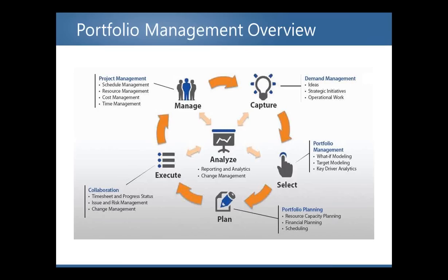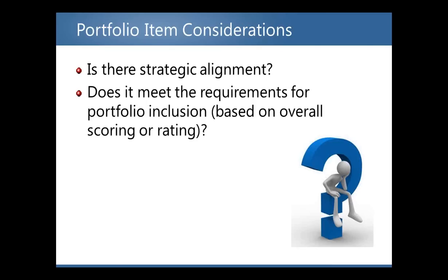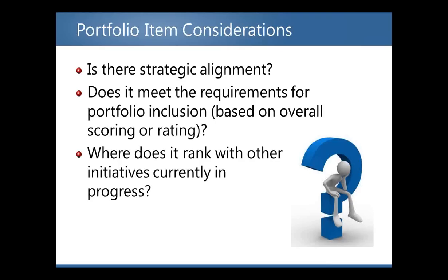Most of us, when new demand comes in, we raise our hand and say we'll get it done. But there are some important steps to consider before that work is accepted into the lifecycle. In the portfolio management cycle, the following general questions will be asked for every item in your portfolio: Does the project or work initiative align with the organization's strategic objectives and goals? If the answer is no, it should not be considered for execution. Based on defined key performance indicators and probable risk, does this project meet the requirements for portfolio inclusion? And where does it rank with other initiatives currently in progress? We can't just accept all work when new demand comes in — we need to analyze it against what's currently going on to make the proper decision whether we should move forward.